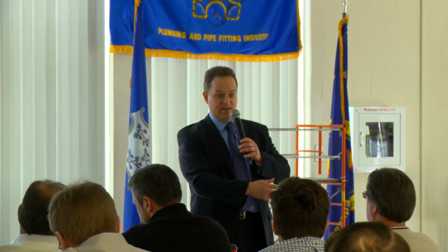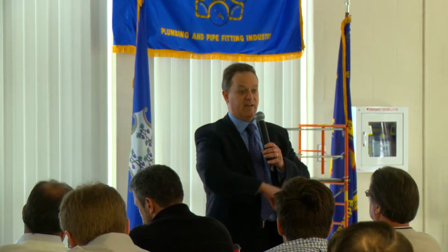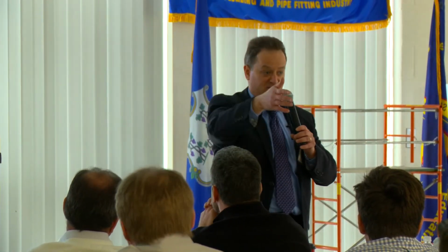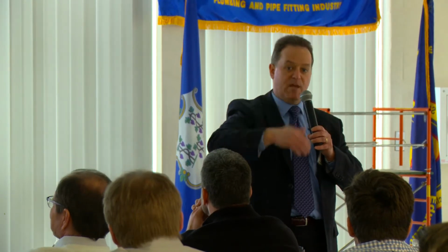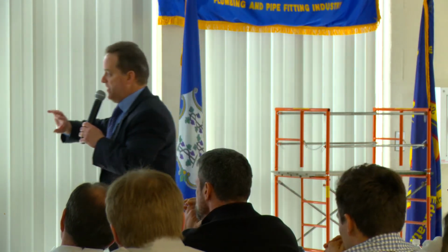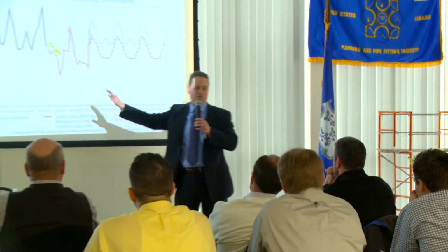Out goes a less energy use intensity type tenant, and in comes a data center type who takes the 30,000 square foot, and their energy use profile is they're 3x the guy that just left, right? That may be cause to sit down and recalculate a baseline, right?